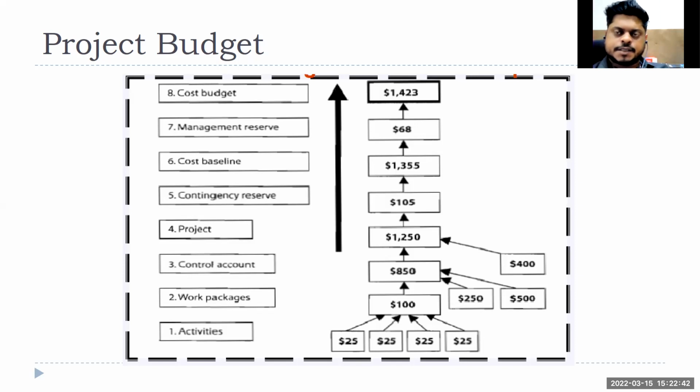You need to have extra AC cabin. In a rainy month you need to have additional support work, right? That needs to be taken care of in the contingency reserve. But something which is beyond your control, right? Unknown risk, what I was talking about some time before, right? That will be taken care of in the management reserve. How are these two things different?